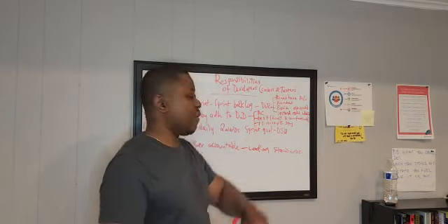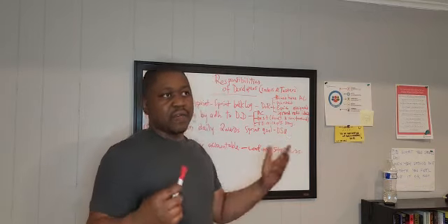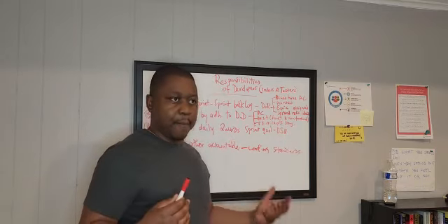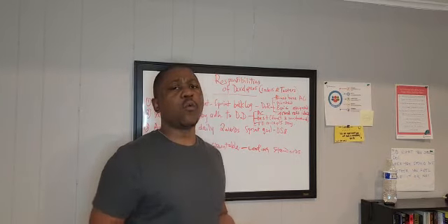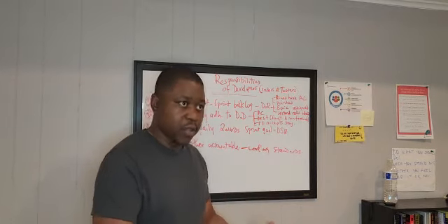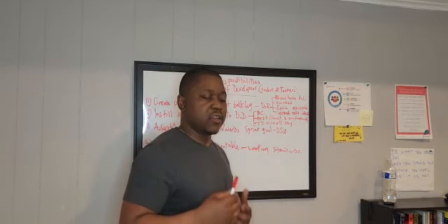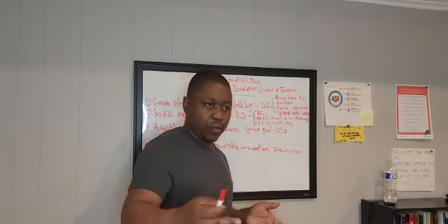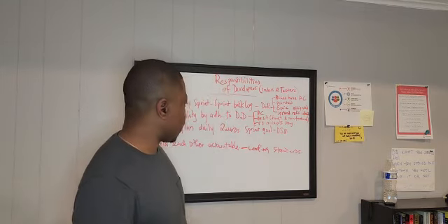So each story should have what? The acceptance criteria. It should also be pointed. They must have an estimate as per their capacity. They should be able to commit only to work that they would be able to deliver on. And they can only know that depending on their capacity and how many story points they can actually do within that sprint based on their average velocity.